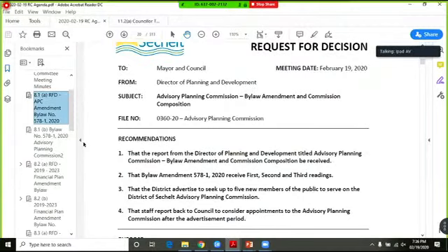The purpose of this report is seeking council approval to apply to the Investing in Canada Infrastructure Program, ICIP, Green Infrastructure second intake, and the financial commitment from Sechelt, $232,230. That is 26.67% of the total estimated project cost, $870,750. This is the background information. The district previously applied to the Investing in Canada Infrastructure Program Rural and Northern Communities, ICIP RNC, in early 2019. The program has not yet awarded it, and the district's application is not guaranteed for that particular grant. So that's why staff are recommending to apply for this grant.